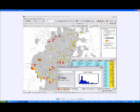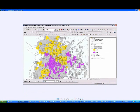And we did this in a meeting. It took about maybe an hour with both contractors present and our contracting team, and the ending result was this. We zoomed out a little bit, and Barnhill ST233 ended up with all of these purple streets, and Triangle ended up with all of the yellow streets. So then Triangle can move cleanly from one street to the next in their geographic area and not hopscotch around like our original plan had.